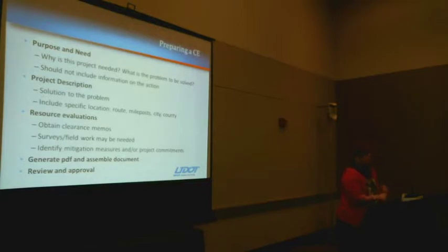A purpose and need is not a project description. That's one of the things we check for when we do our audit with the CE MOU, is that your purpose and need does not include elements of what your construction activities are going to be.